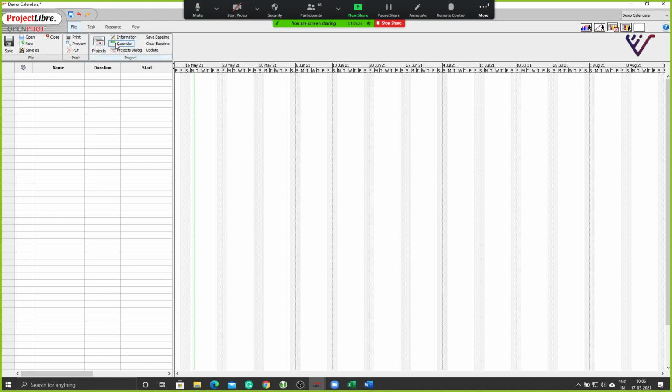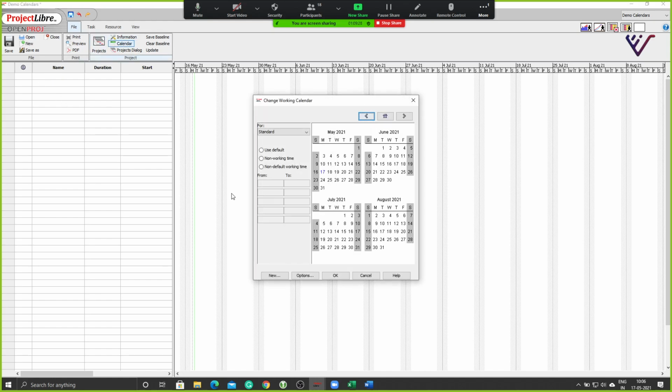So Saturdays we can't select as a part of the work week? Yes, I mean a work day. You can make it. So now in this 10-hour work week, all these days are now working. So you're saying you want to make Saturday also working, right? So I will select Saturday and I will make it non-default working time. So I will add Saturday also to my working.